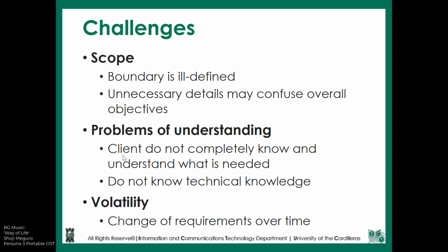Another challenge that we have is volatility. If you have a longer time, the tendency is that the requirements may change. One day your client might talk to you and say, they saw something like this in another company, and they may want to add it. That would again affect your scope. Something that really affects that is the time. If you have a longer time, the tendency is that the scope would change as much as possible.